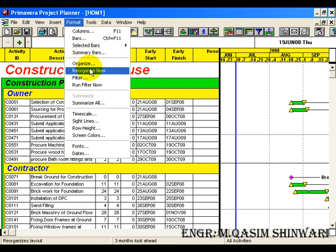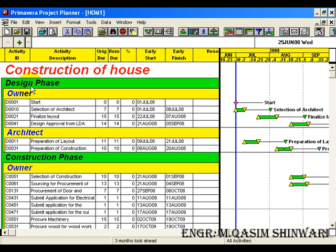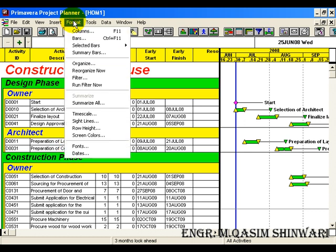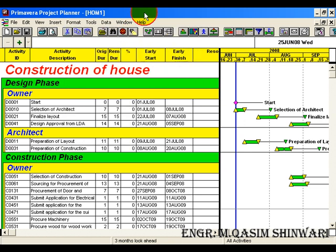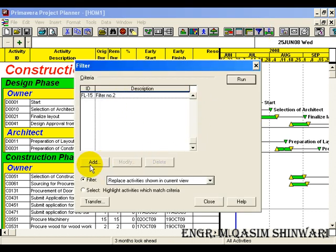Let me undo that — again make the order of design phase 1 and construction phase 2. Close it, Format > Reorganize. Now here you can see it's organized again. Second thing we are going to apply is a filter so that we will add activities lying in the next three months only. For applying filter, go to Format > Filter, or you can also access the filter by clicking the filter icon. Add a new filter.